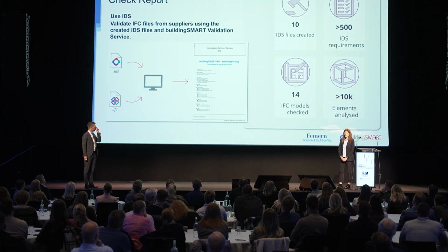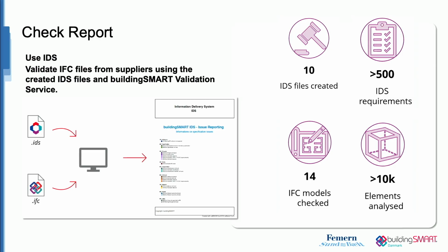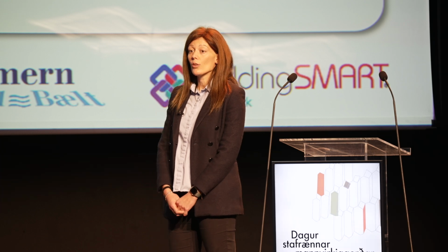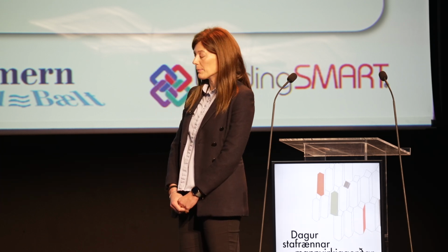The delivery of this second phase on the creation of the IDS gave us the opportunity to have 10 IDS files created. And this number is based on the different types of contract requirements that we have in the different contracts. And those 10 IDS files contain more than 500 requirements.